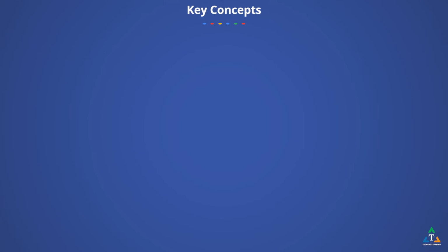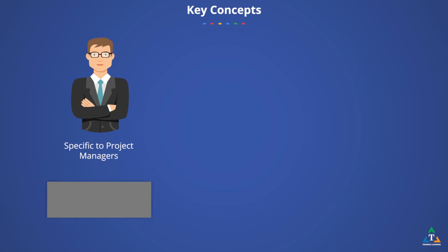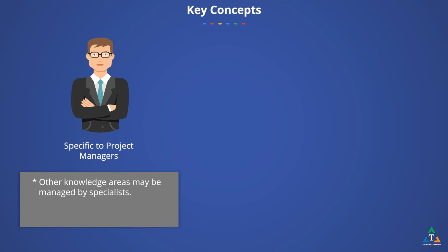Integration management is the key responsibility of the project manager, whereas other knowledge areas may be managed by specialists, for example cost analysis, scheduling specialist, risk management experts. The accountability of project integration management cannot be delegated or transferred.